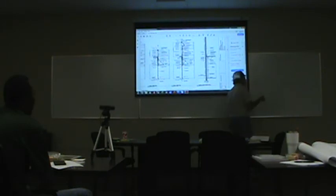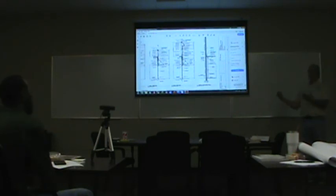Okay. Now what could go on at the same time walls are being framed? Well, your electrician can be running his primary service or his secondary service in the building. It says wireway on the outside of the building, right? Run gas piping. Okay. Conduit and so forth. Where are they going to be in the schedule? What's holding that activity from starting? Roof drying slabs. Okay. Gas piping's going to be run on the roof. Once that roof is done, he can start running that. So once again, you take each of your activities.